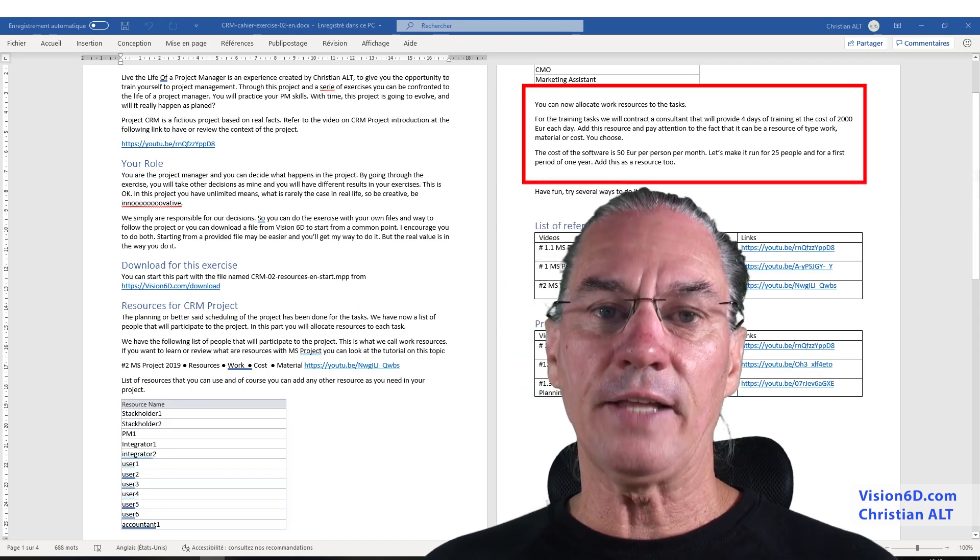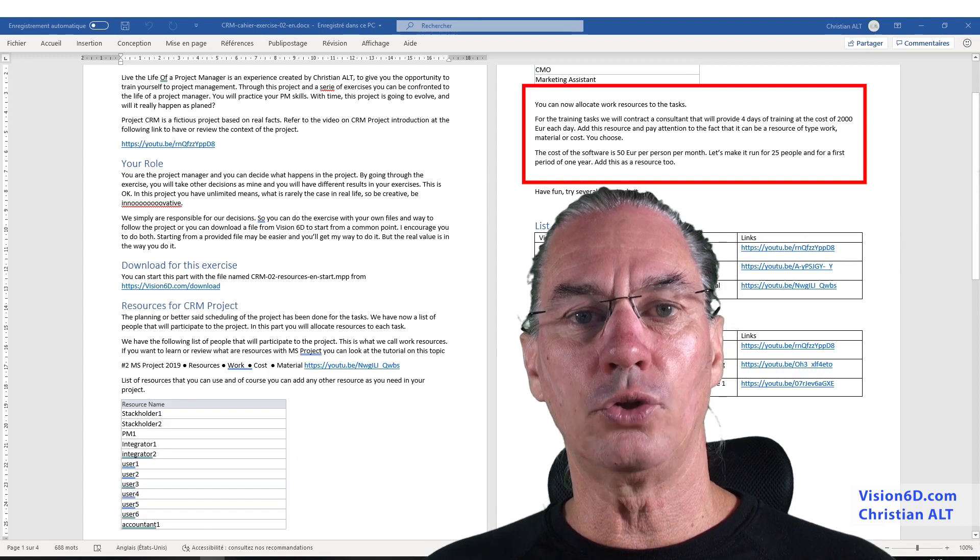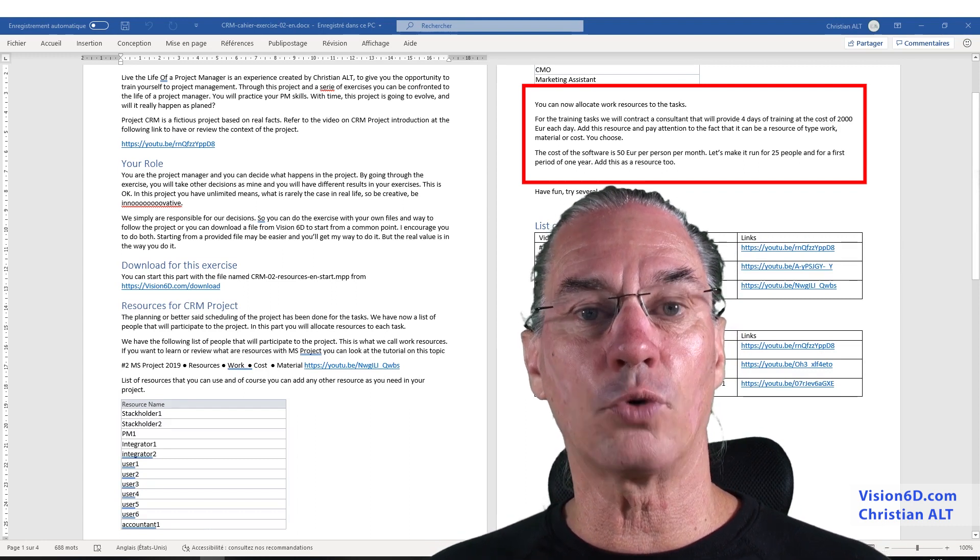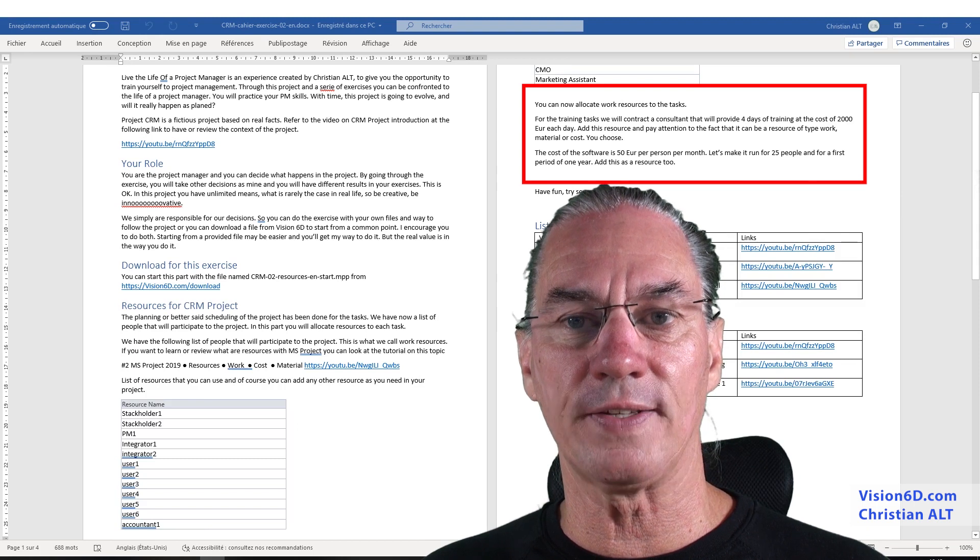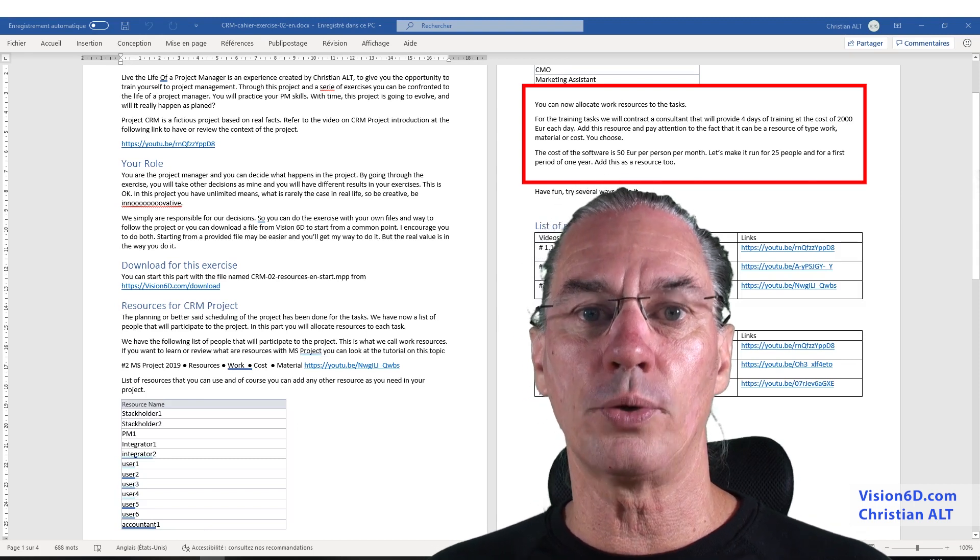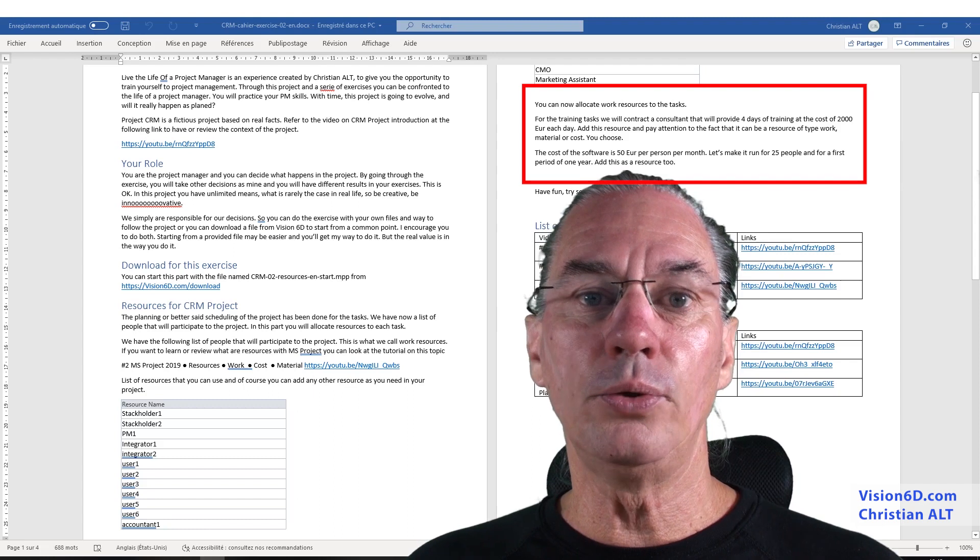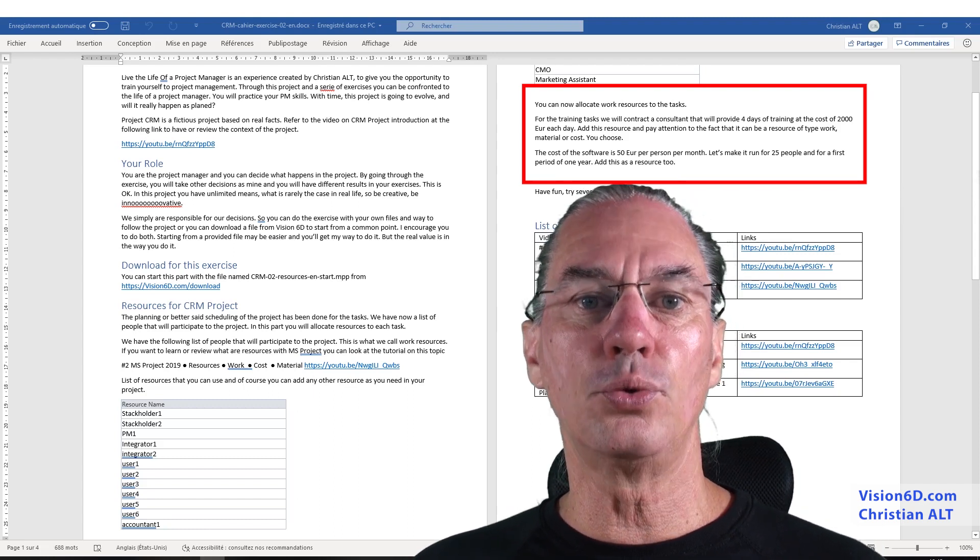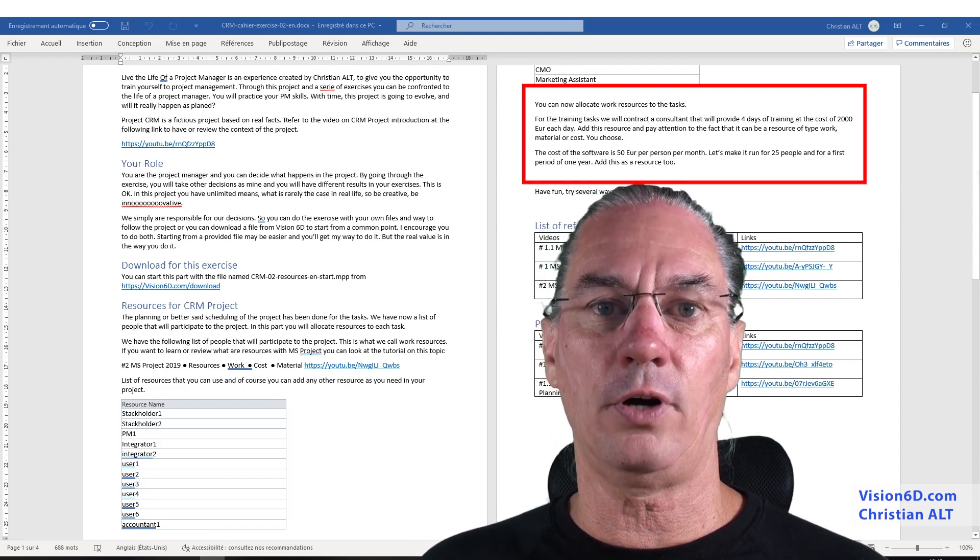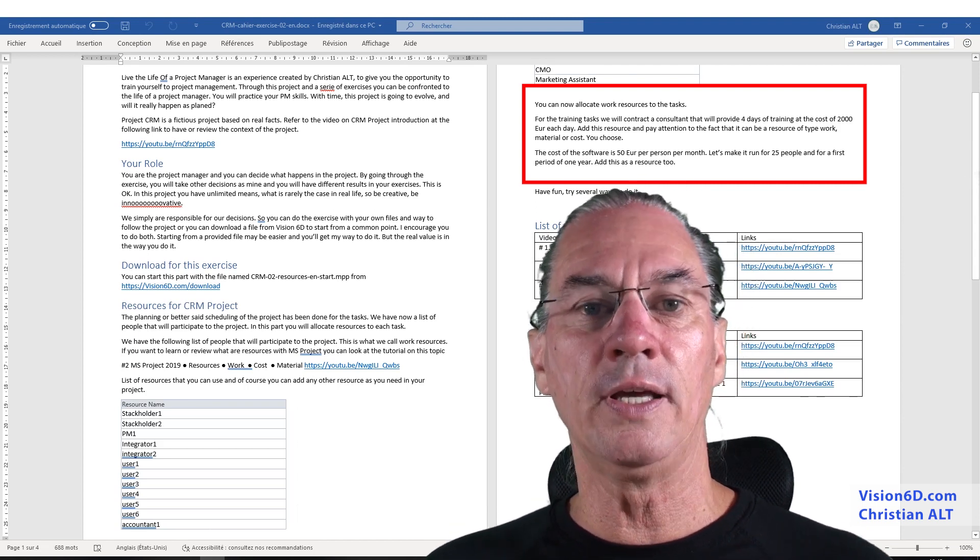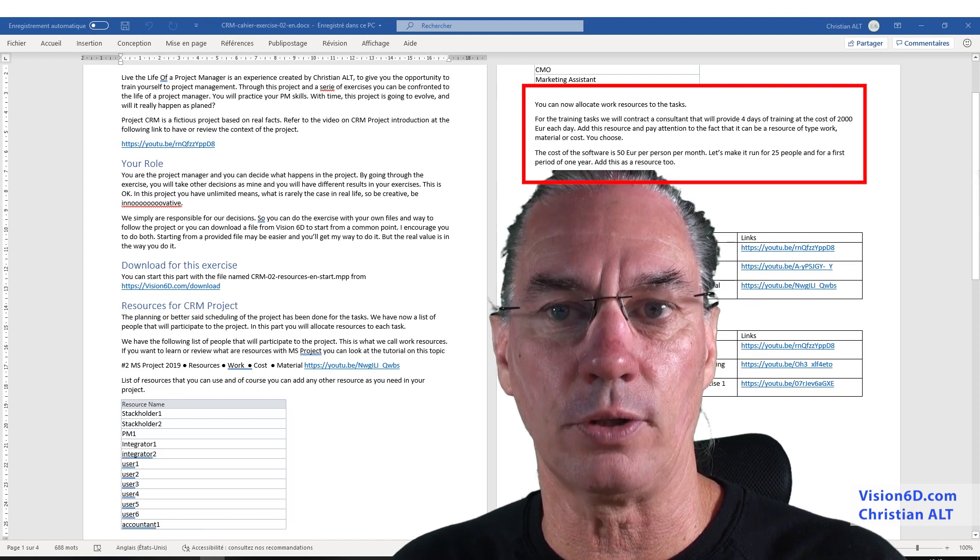There is another task, which is the training, for which we are going to hire a consultant. There are four days. The consultant is going to charge us 2,000 euros per day. He will do this in batches of two days. Like that, we can train half of the people during one session, and the other half during the other session.